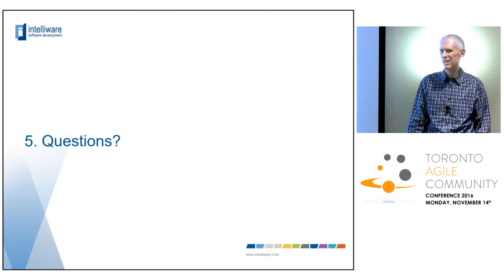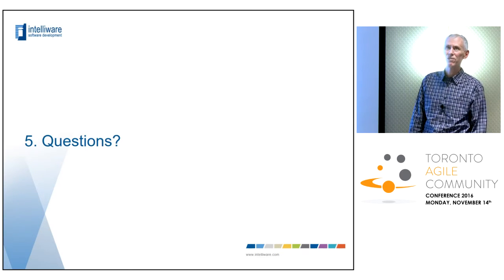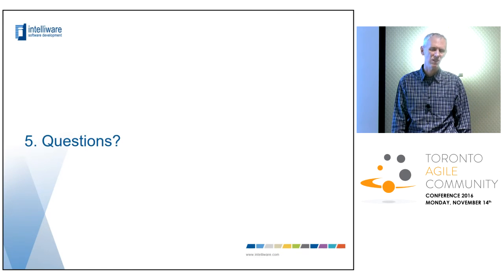When you start getting into 80% velocities, that means 32 out of 40 hours a week is strictly writing stories, and there's lots of other things. I just mentioned estimating meetings, stand-ups, right? You are really making things tight there.